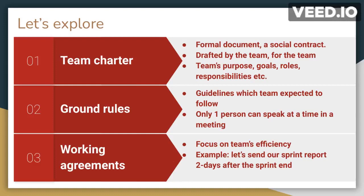Even budget information was mentioned in some team charters, but the specifics may vary from team to team depending on the needs of that particular project. The idea is that the team charter serves as a formal document, like a social contract, drafted by the whole team. There are a few additional things that may be mentioned, such as decision-making processes and how conflicts might be resolved.